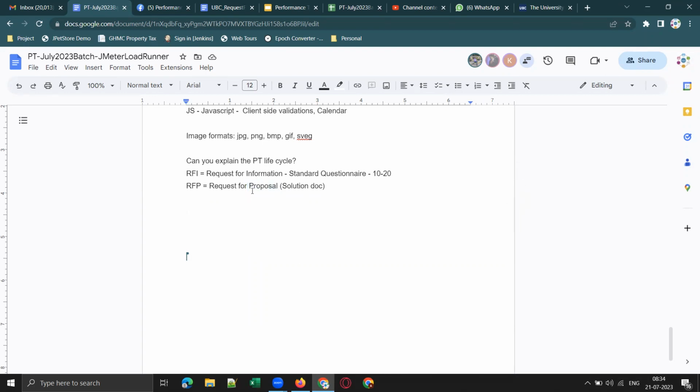For example, you have to propose the team structure also. For instance, this project requires one team lead, 2 senior software engineers and 2 junior or associate software engineers. You need to propose the team structure, and this project will take at least 4 months to complete. I'm just giving some examples. It need not be exactly 4 months.